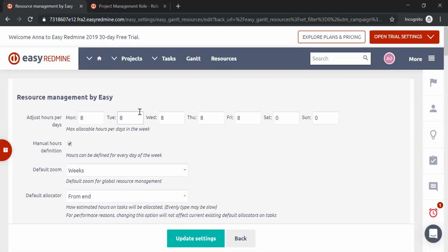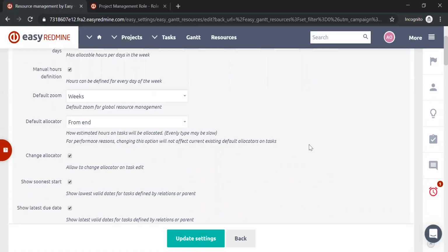This is the usual thing, of course, such as if you have users who are machines set up in your system, then naturally they can, for instance, work 24 hours a day. So that one you will adjust for them individually. Or if you are in a country where you actually work Sundays because you don't work Fridays, like in the Near East, then you can change that over here, because that's something that applies throughout your application and affects everyone. Or if you have various teams in various locations, then again you would adjust it for each team or for each user based on the location that they are in, so it suits their working environment.